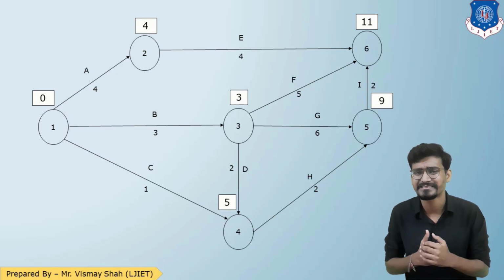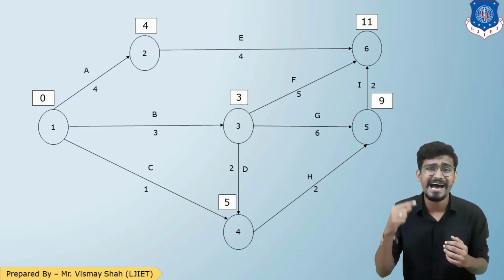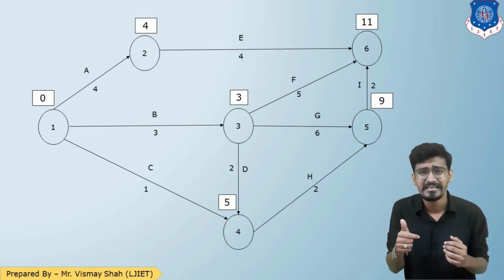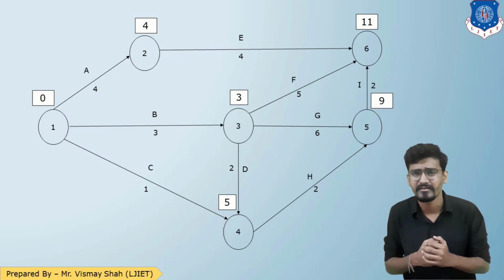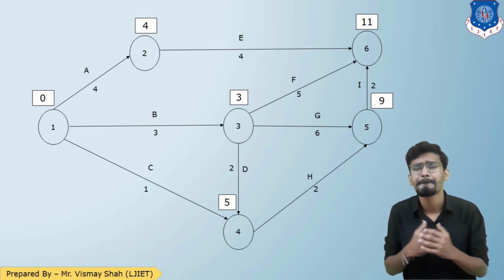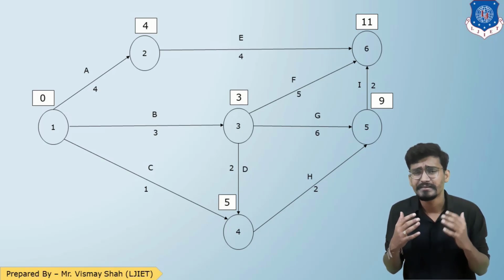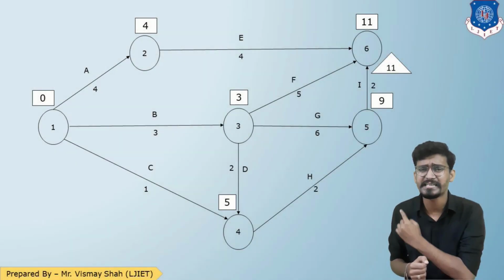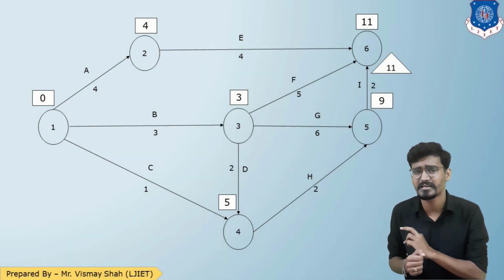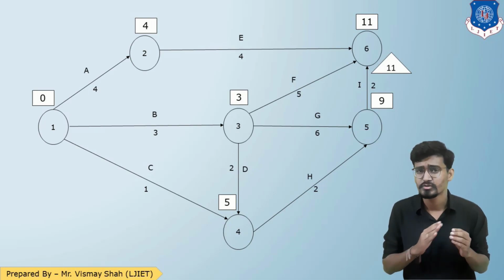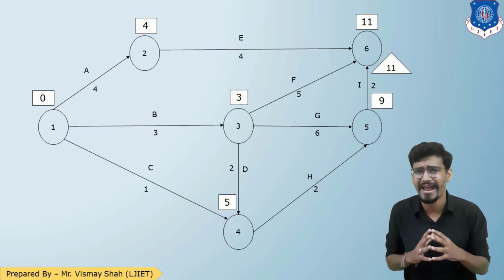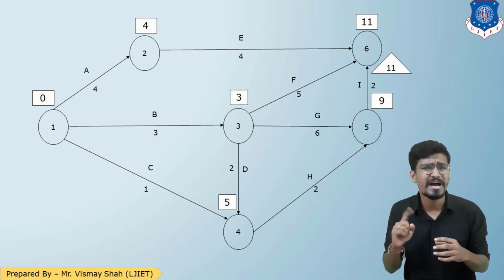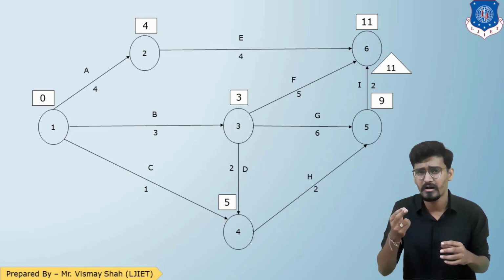The backward path analysis says that the last point, event number 6, was completed on 11. So write 11 again below event number 6, in a triangle. The forward timings will be represented in a square and the backward timings in a triangle. Both the up point and down point of event number 6 have been completed.